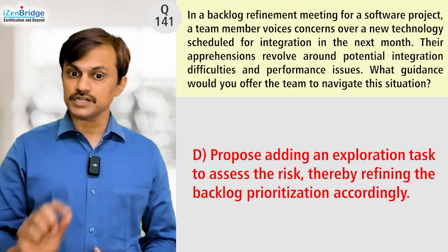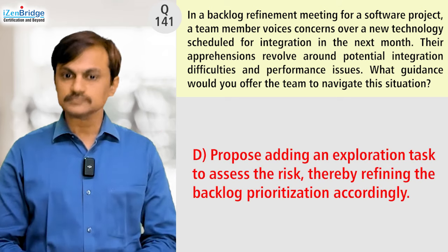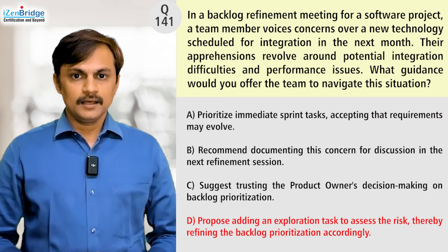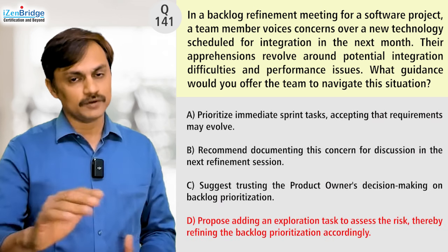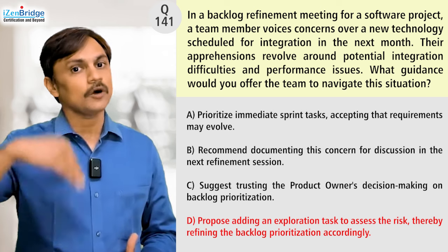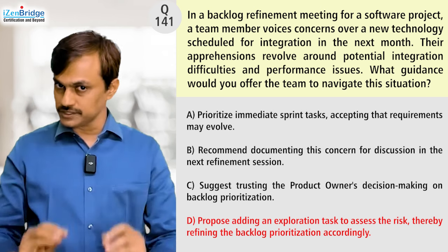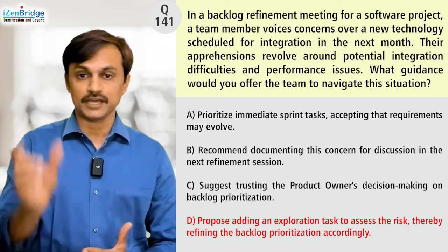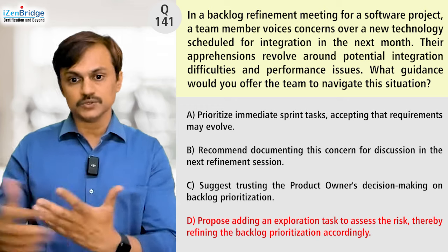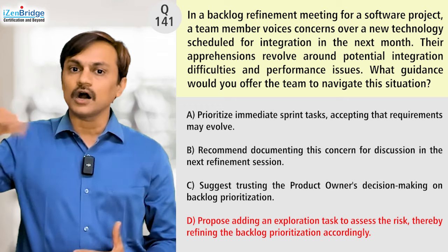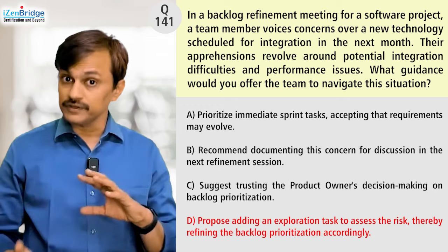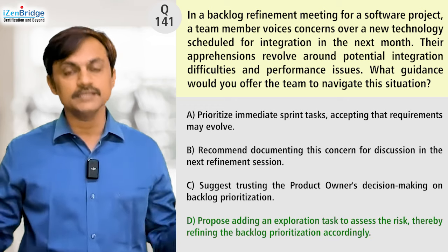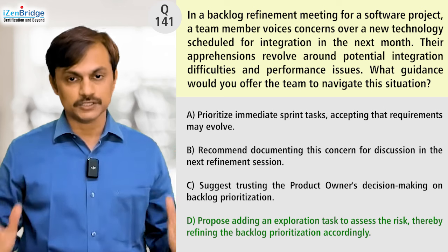Option D: propose adding an exploration task to assess the risk, thereby refining the backlog prioritization accordingly. This looks good — it's a more proactive approach. It includes the documentation aspect from Option B, but goes further by adding a technical exploration item into the backlog. We then refine and reprioritize the backlog based on what we learn, responding to the risk properly. This is the right option.